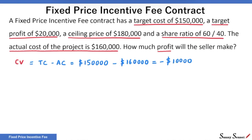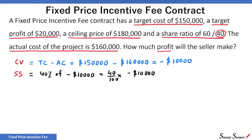Minus is definitely not good — it indicates a cost overrun. The seller has spent more than the target. The second term in the share ratio is 40%, meaning 40% of the cost variance is the seller's responsibility. Seller's share of risk in our example is 40% of minus $10,000, or minus $4,000.